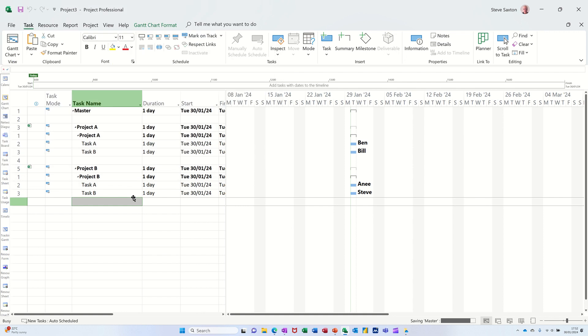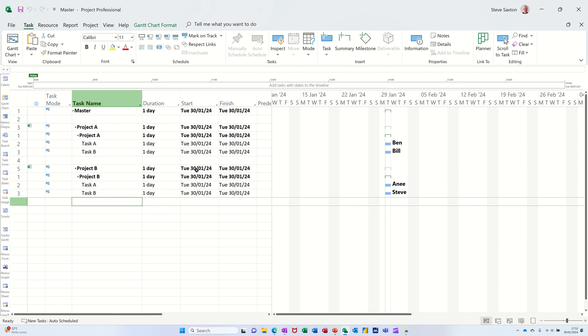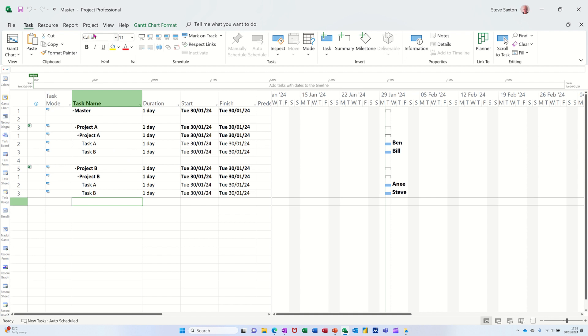And then do the report. So there's the information coming in. These are live links. If I do any changes on this, it will actually update these sub projects and vice versa. If anybody changes one of these sub projects, I will see that impact here in this master file. Now, in terms of reports, I want to see the allocation for each project in terms of resources. Sometimes you might have the same resources on both projects, so that might be the case that you want to have a look at whether there's any clashes or things like that.